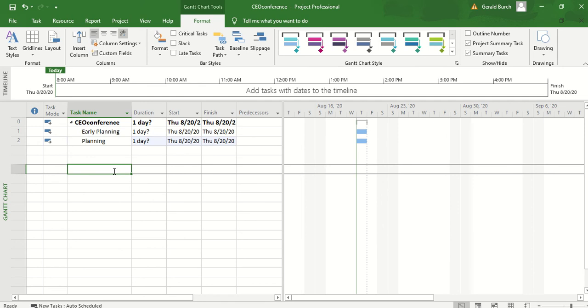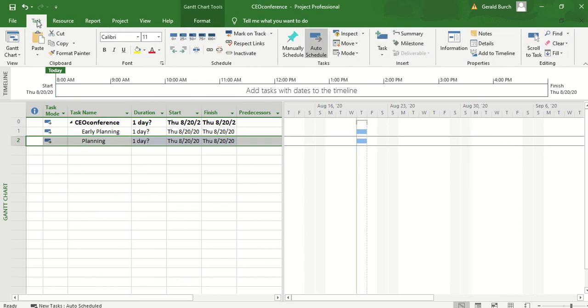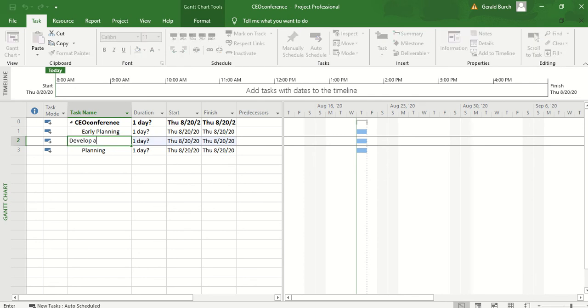Now we can go in and we can start introducing our sub tasks. Again, all of those sub tasks are written on page two of your instructions and you can insert these other tasks a couple of different ways. What I want to do is I'm trying to insert the subtask develop agenda and schedule which is a subset of early planning. I can click on this and if I go up to the task bar, I can come over to insert a task and it's going to insert a task directly above it. So for early planning, I can go ahead and develop agenda and schedule.